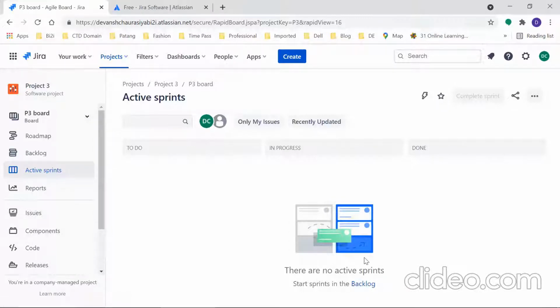Now, issues that we captured earlier, an issue can be an epic, can be a story, task, subtask, bug. Now, epic is at the broader level. Under epic, you'll have multiple stories. Under story, you can have subtask, or under epic you can have task, and under task you can have subtask. Clear? Okay. Now you need not have an epic. You can directly have a story. You can directly have a task. You directly cannot have a subtask because a subtask is a subtask under story, or it's a subtask under task, right? You can also have a subtask under epic, if I'm not wrong. We will check that. Okay.